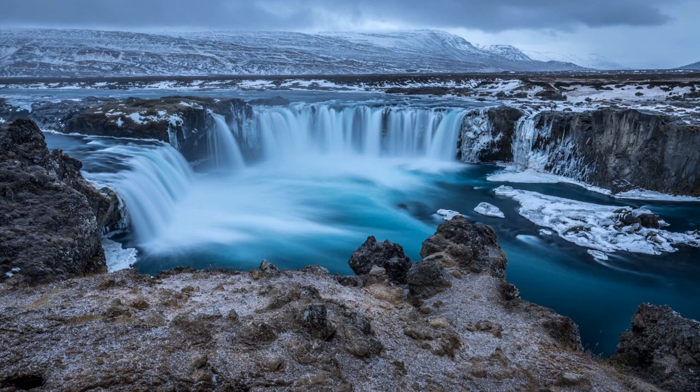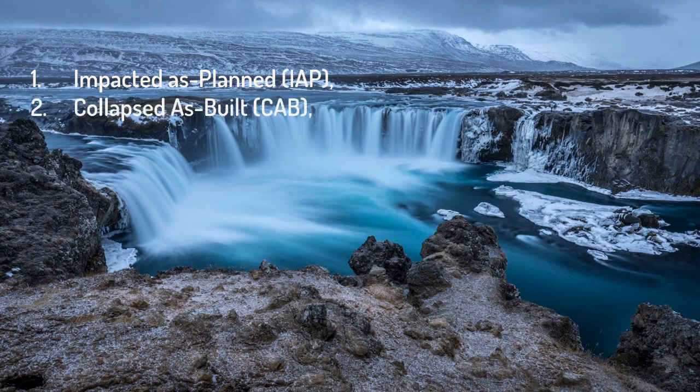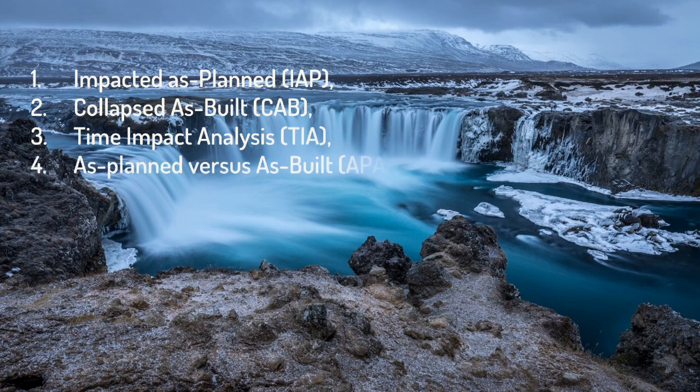Finally, before concluding this video, I would like to highlight one important thing which is relevant with CPM program, and I shall cover it in my next videos in this series. All commonly applied forensic delay analysis techniques generally fit within one of the following primary categories: impacted as-planned, collapsed as-built, time impact analysis, as-planned versus as-built.